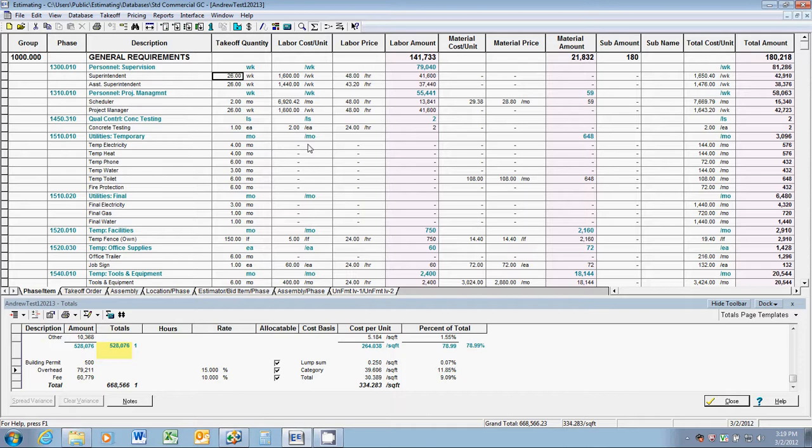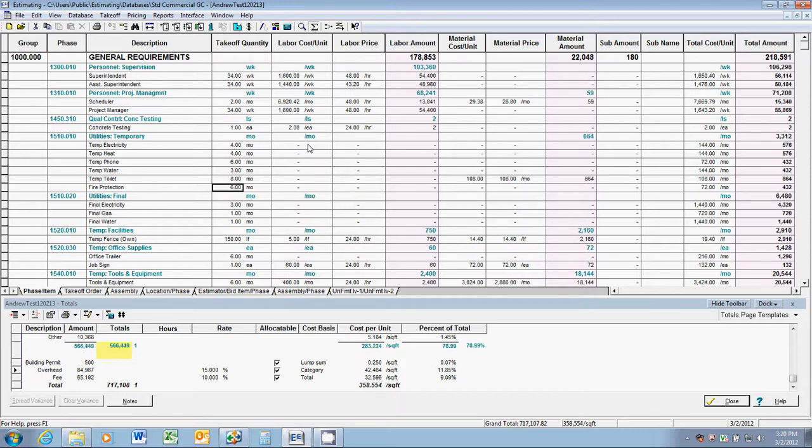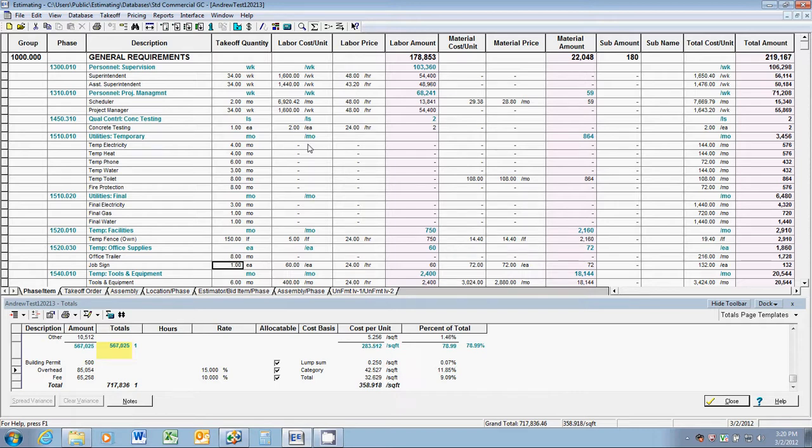Twenty-six weeks goes up to 34, 34 weeks for the assistant superintendent, 34 weeks for the project manager. Some of our temporary utilities, we'll just leave them the same, but the temporary toilet, definitely we need another two months on that. We'll make that eight months. Fire protection, eight months. And finally, we love that office trailer, so we're going to keep that for another two months, make it eight.